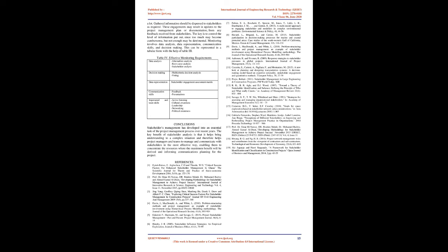Table 3. Stakeholder inputs, tools, and techniques and outputs. Inputs: stakeholder management plan, communications management plan, change log, organizational process assets. Tools and techniques: communication methods, interpersonal skills, management skills. Outputs: issue log, change requests, project management plan updates, project documents updates, organizational process updates.